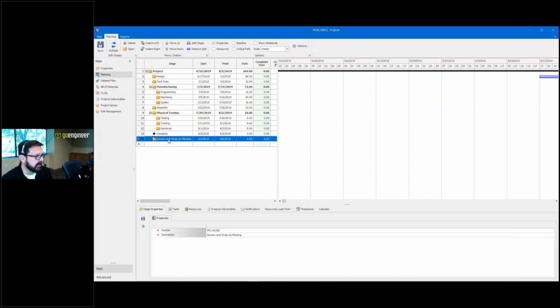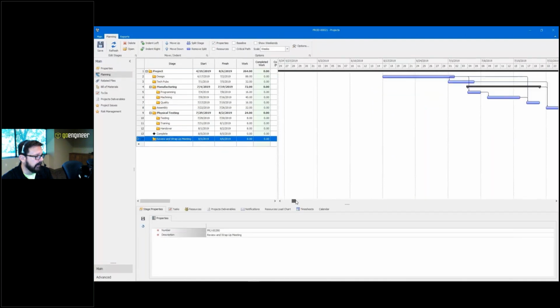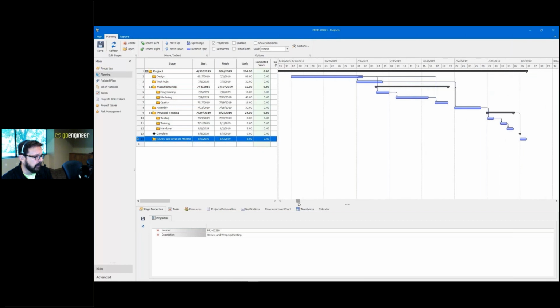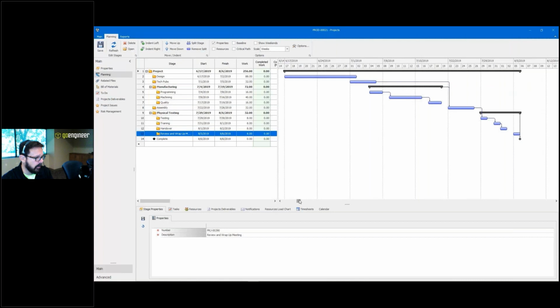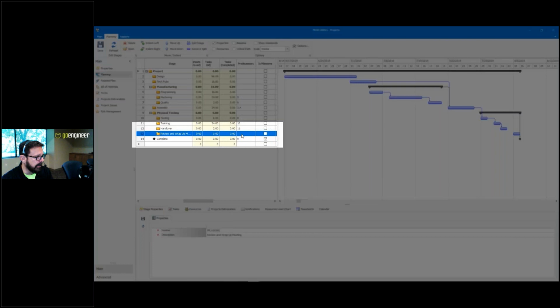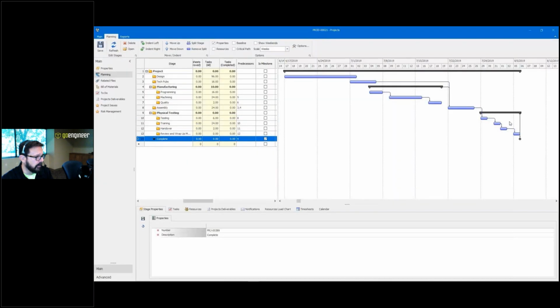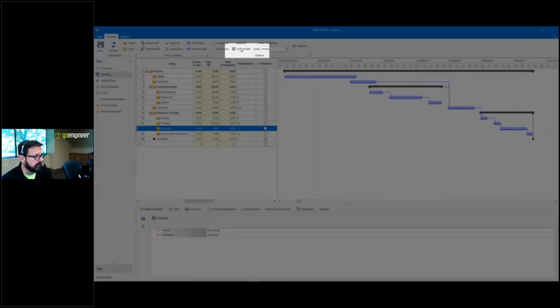And then I can use these nice tools. If I've set the date in the future, you might have to scroll over on the calendar so you can see it. Then I can use these nice tools like move up and indent. And if I want to make a parent-child relationship, like check out right there at the end, I'm going to add a parent-child relationship by giving it this dependency right here. And now you can see if I move one, the child is going to move out. And then if we want to check critical path, we can do that as well. So right here is critical path.